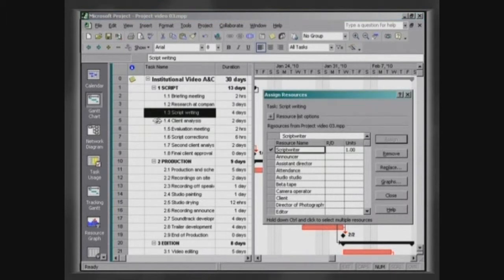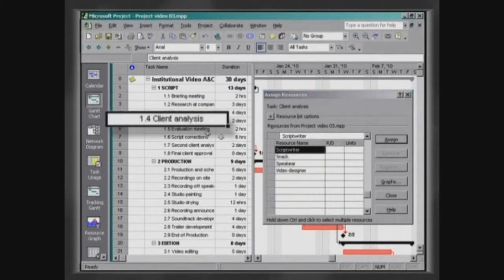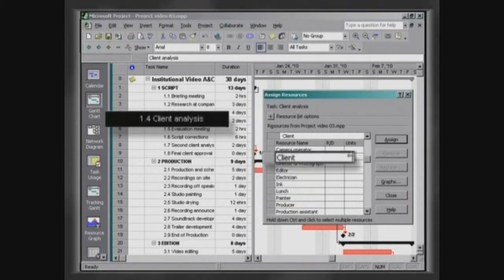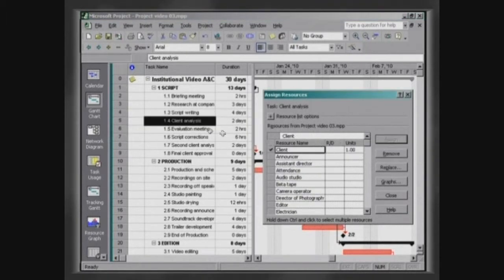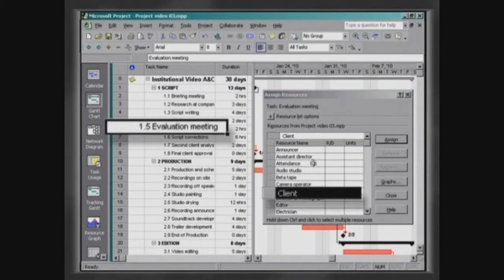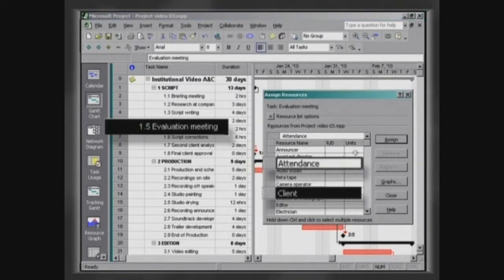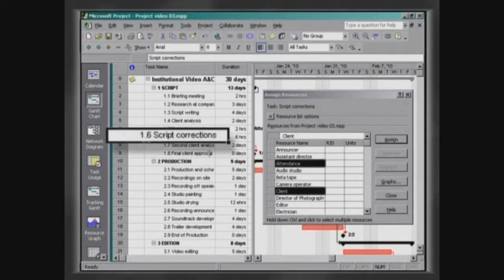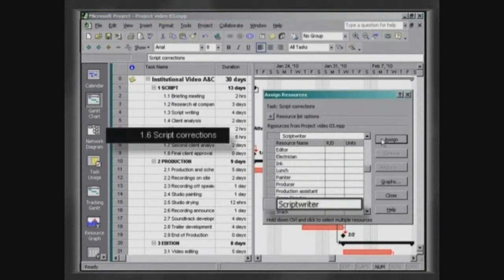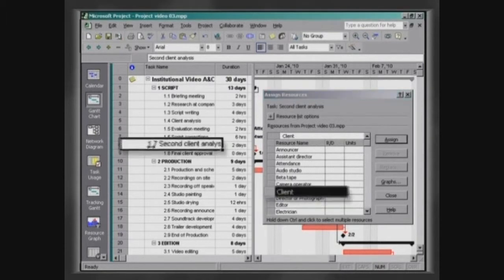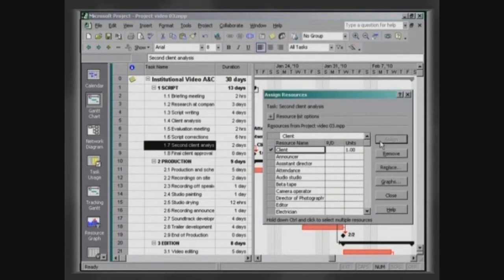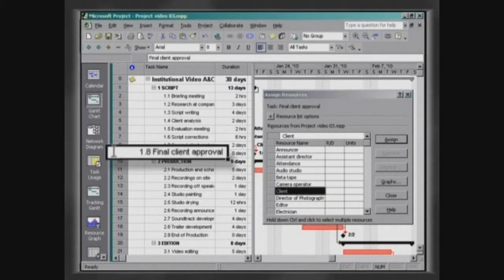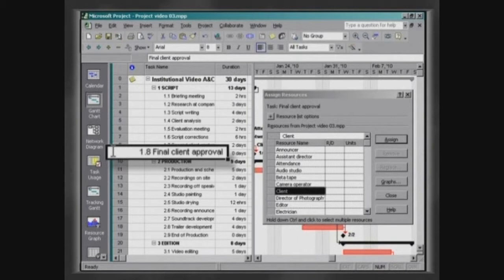In the same way, attribute Client to Client Analysis, Client and Attendance to Evaluation Meeting, Script Writer to Script Correction, and Client to Second Client Analysis. Remember that the activity Final Client Approval is only a milestone and therefore no resource would be attributed to it.